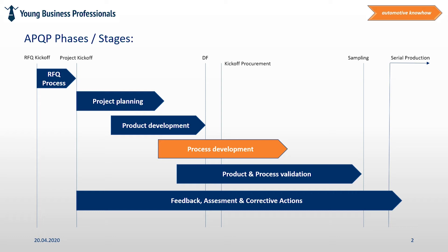It makes sense to think about how to assemble the product already at that time. It is useful to start as early as possible in parallel to the product development phase and to cooperate as closely as possible with the engineering department. The procurement kickoff is also part of that process, and parallel product validation tests are being performed as well. That's the reason for the overlapping of the process development phase and the phase for product and process validation.